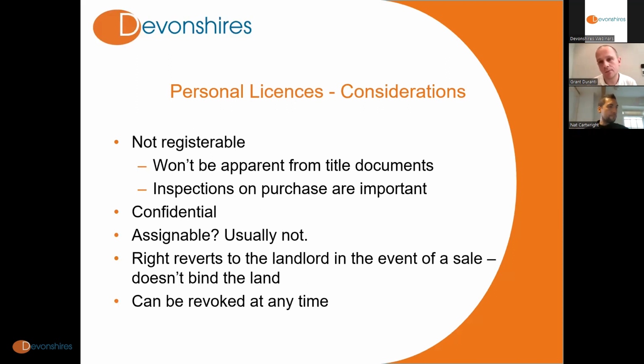They are rarely assignable. Technically, it's possible, but it is highly unusual, and I'd say if you're granting a license, you wouldn't want it to be assignable, just because of its very nature. If it's a right to do something which is temporary and personal, you wouldn't want that person to then be able to assign their license to somebody else. And similarly, on that theme, because it doesn't bind the land, it extinguishes on a sale, and that person would no longer have the right to do whatever it is that they've been doing.